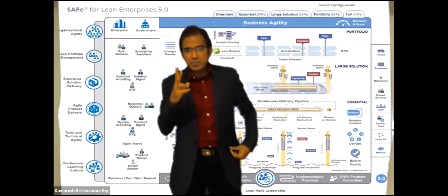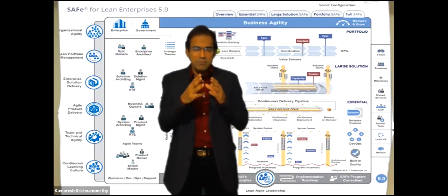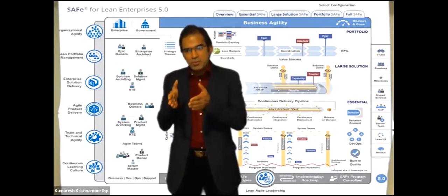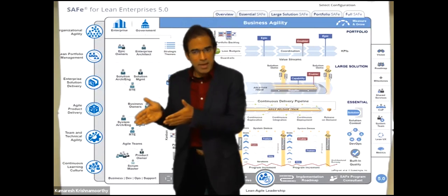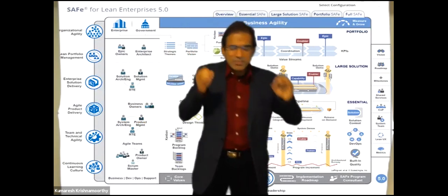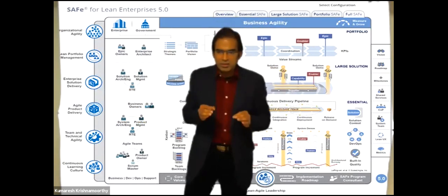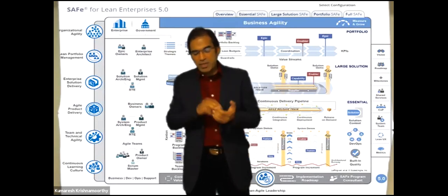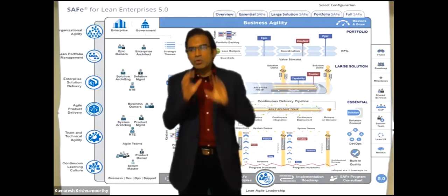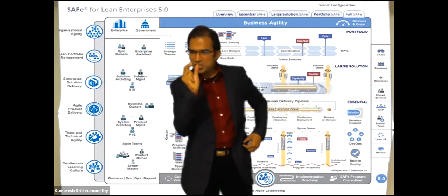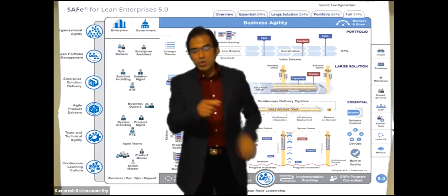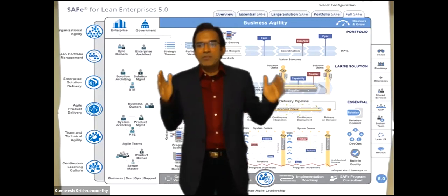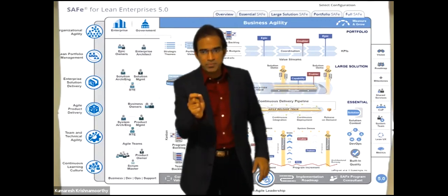The second advantage is that the teams become familiar with the work that they need to plan during PI planning. It's very important that the teams are already familiar with the work. Make sense? So this is what I always try to do, making sure the features are broken down into initial stories. The word initial is very important. You don't want to break down the features into all the stories and say that we are done with breaking features into stories. No, that's an anti-pattern.